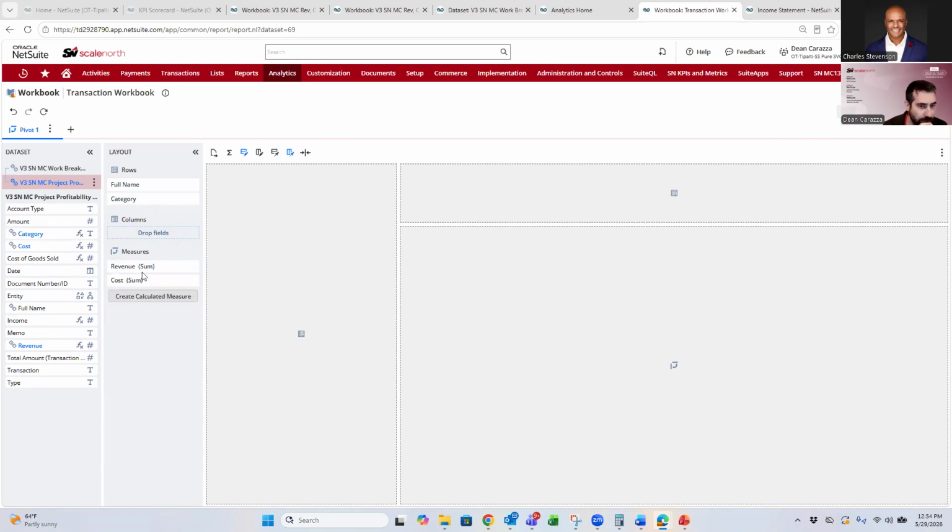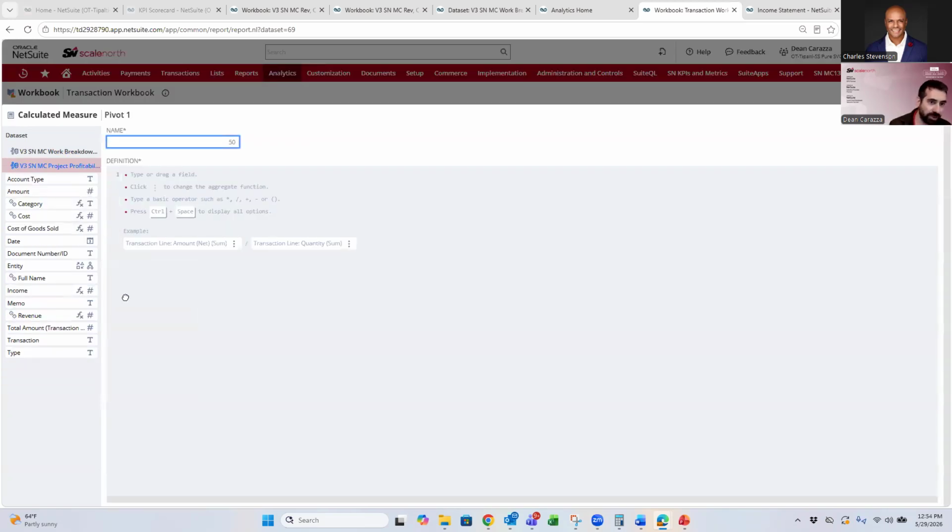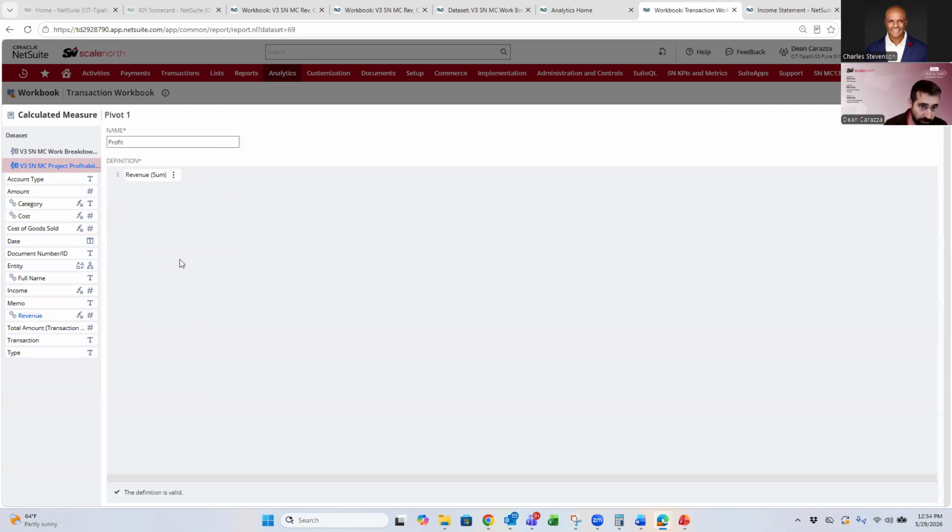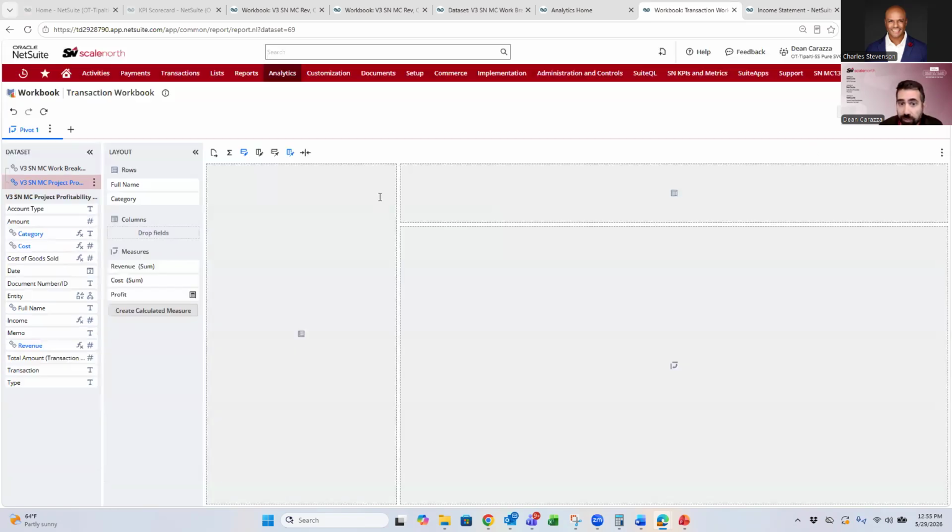And we can create a calculated measure for profit. So click there. We're going to call this profit. And that's basically your revenue plus, because I'm showing my actual cost as a negative value. So plus our cost, and that would be our profit. So hit apply. And we'll save this workbook.